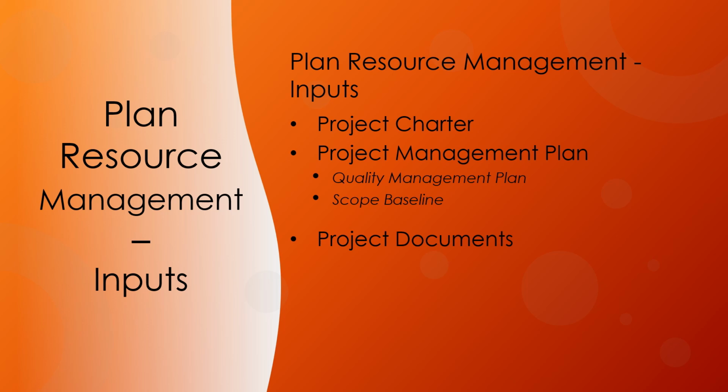Project documents that can be considered as inputs for this process include project schedule, requirements documentation, risk register, and stakeholders register. The project schedule shows the timeline for needed resources. The requirements will dictate the type and amount of resources needed for the project and may influence how they are managed.